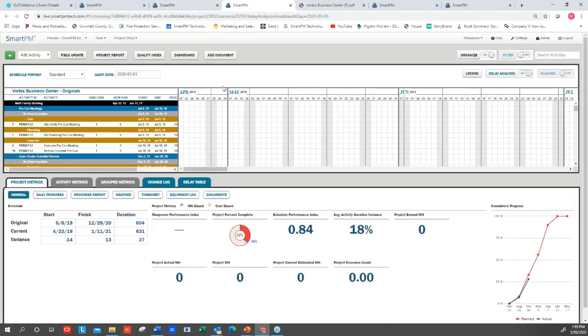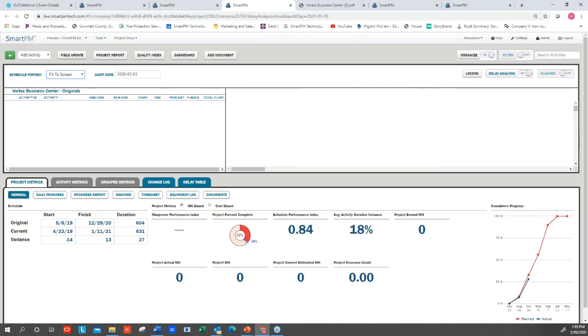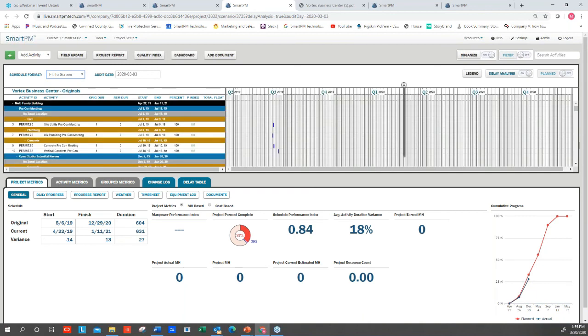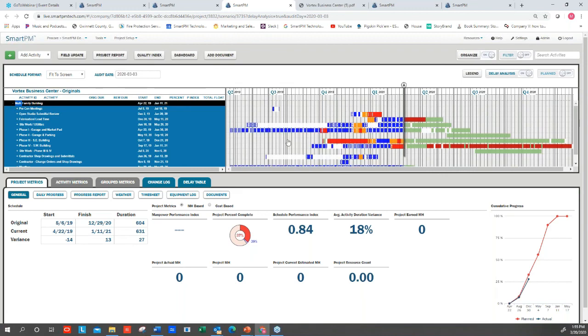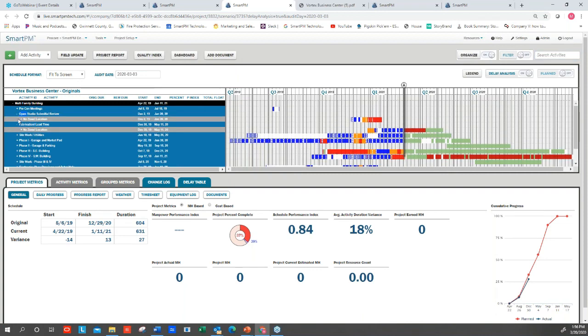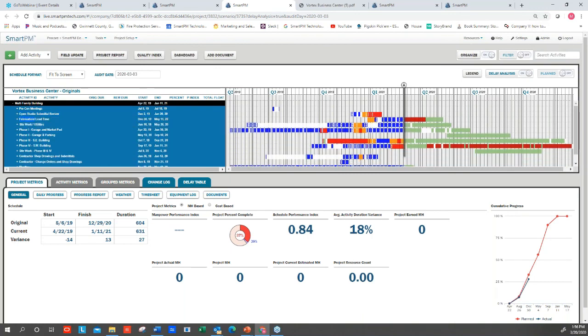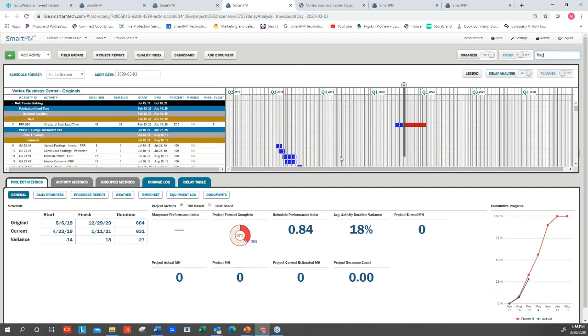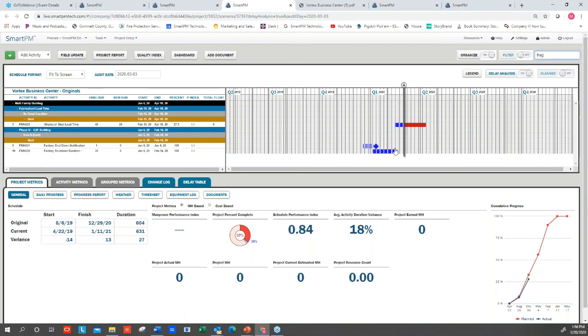If we open this up and take a quick look, if we look at this from the perspective of the schedule before that impact, with the logic that was contained within, we see here's where our critical path was going through this southeast building. It looks like there were some submittal review issues going on. But when we put those fragnets in, and I'm going to do a quick search for them so you can see that they're in here, we see there's some fragnets here for that shutdown, and you see that that's not highlighted as critical.